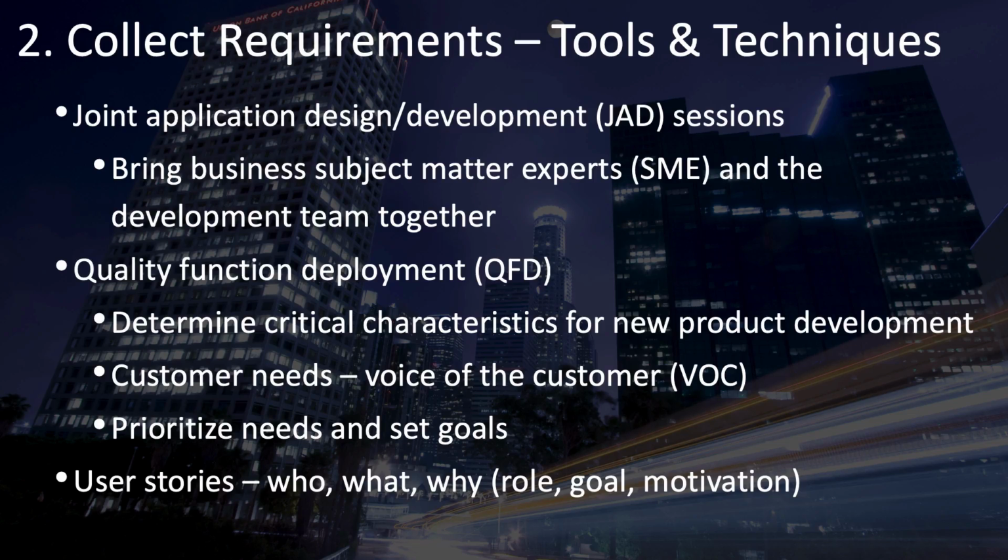That's a very different requirement that may sound the same on the surface until you start talking about who needs it and why they need it. How are they going to use this feature? The requirements are much more stringent if you need to take this into court, and will involve some cryptography in order to make this work.